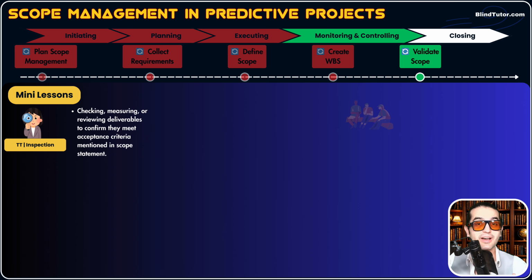Those are verified deliverables, okay? We have this list. Verified deliverables are those deliverables which passed our internal quality expectations. Now, these are ready to present to customers, okay? So you hold a meeting and you have verified deliverables in your hand, and the stakeholders are sitting there. This is the first step.